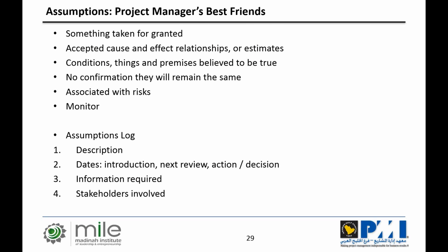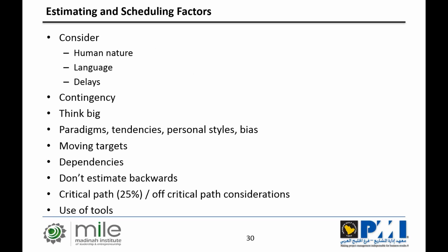We talked about assumptions. We said I don't want to hate assumptions. Probably if you take away one thing out of this 45-minute presentation, you've got to take this away. Manage your assumptions. If you don't like spreadsheets, do it with sticky notes in your pocket. Every time write the assumption, and then again, when the date comes, check if the assumption is standing or not. Or when you talk to a stakeholder associated with it, check if they actually have the answers for you or not. And management of assumptions is key for proactive risk management.